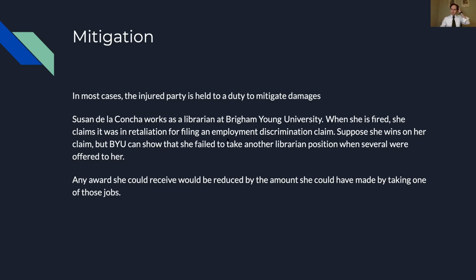Okay. What's not in my slides that I need to tell you about are liquidated damages. It is in the reading. Liquidated damages is where I say, you're going to sell me a box of cookies and I'm going to pay you 10 bucks. If you don't bring me the cookies, then you just have to pay me $5. Right? That's liquidated damages.